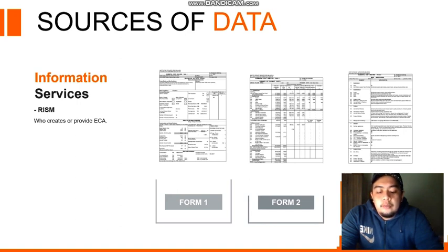Form 1 contains the information of the overall project and the information of the analyzed building. Form 2 contains the summary of the cost of the elements. Form 3 refers to the brief specification of the project.